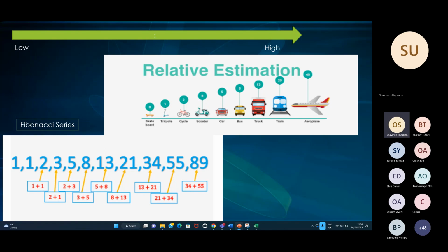Okay, so the higher the number, the higher the difficulty then? Not really. We're looking at it from, okay, it's one story point because it's not complex. You are looking at complexity. So if a story is easy, you can say, okay, 1. So you are right in a way. The higher the number, the higher the complexity. So when it's like 5, 8, 13, it means that it's a bit complex. And when it's going to 13, I will always advise that we break it down, because it becomes big and it's not small again.